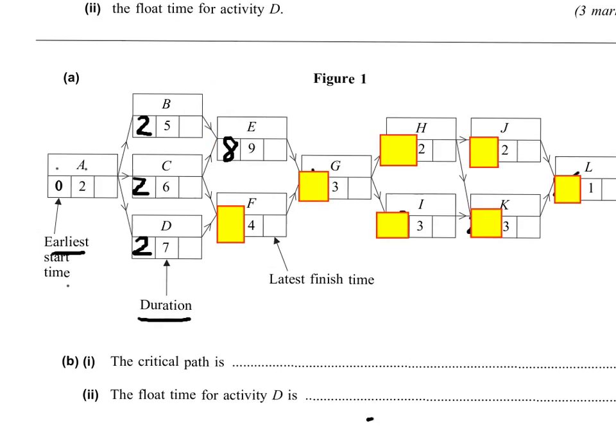Starting from activity F, F depends on C and D's finishing time, so 2 plus 6 is 8, and 2 plus 7 is 9. And F will have to wait for the slow coach D, so starting time is 9. And G is 17, H is 20.